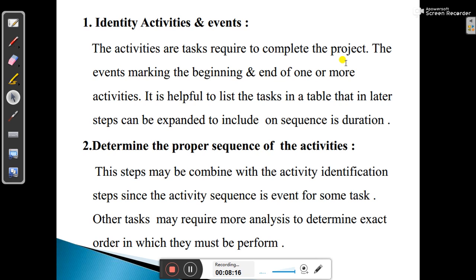So before getting that PERT diagram or network diagram, you can list out all the activities that are going to be carried out in a project in a table. So later, one by one, you can choose which will be done at what time and which will take what amount of duration. In that way, you can arrange them in that network diagram, and it will have a beginning and end of that diagram. So you might assign beginning activities, and you can assign ending activities. So there might be one or more activities like that, beginning or ending.